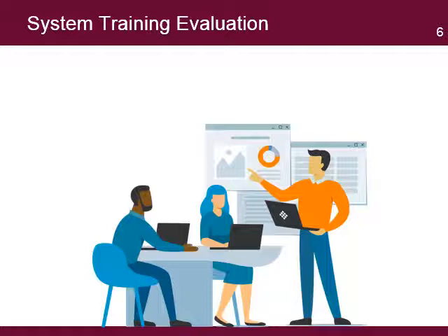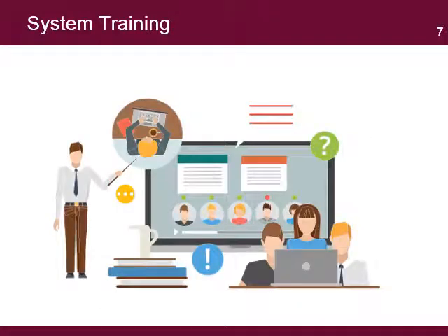Feedback from participants of the training sessions is requested to help identify areas of improvement, either on the training approach or the training documents. After both plans are approved, the next step is to organize the training activities where all project staff will learn how to use the new system. The training can include project support staff, some key stakeholders, and even partners that are involved in the information management process and need to use the system. After all users have been trained and can use the system, the project manager can authorize the deployment of the solution to the various areas or units where the system will be used.